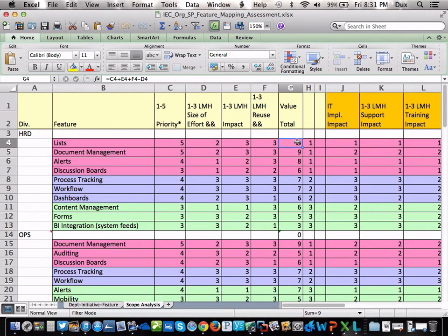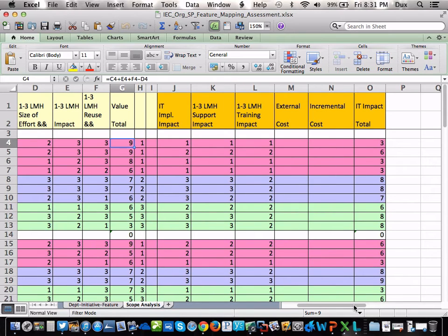And then you look at the reality of IT. Well, there's the business value and business need. What's the impact to IT? Impact to IT is 1. 20 hours, because we got to configure AD, we got to set these up to make it work, stand up a VM, whatever. What's the support impact? It's 20 hours every month. It's beer o'clock. What's the training impact? And then what's the total IT impact?